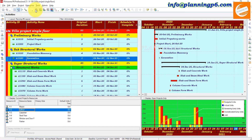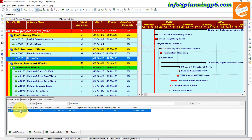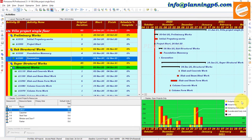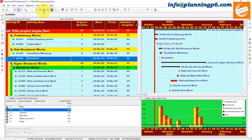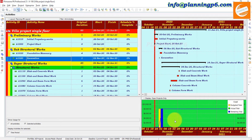Because we have assigned the S-curve to this activity, the over-allocation is showing here. The resource assigned is V2 Labor. We assigned the example S-curve to the excavation activity — that's why it's showing over-allocation for the selected activity, which is over-allocated according to our schedule.